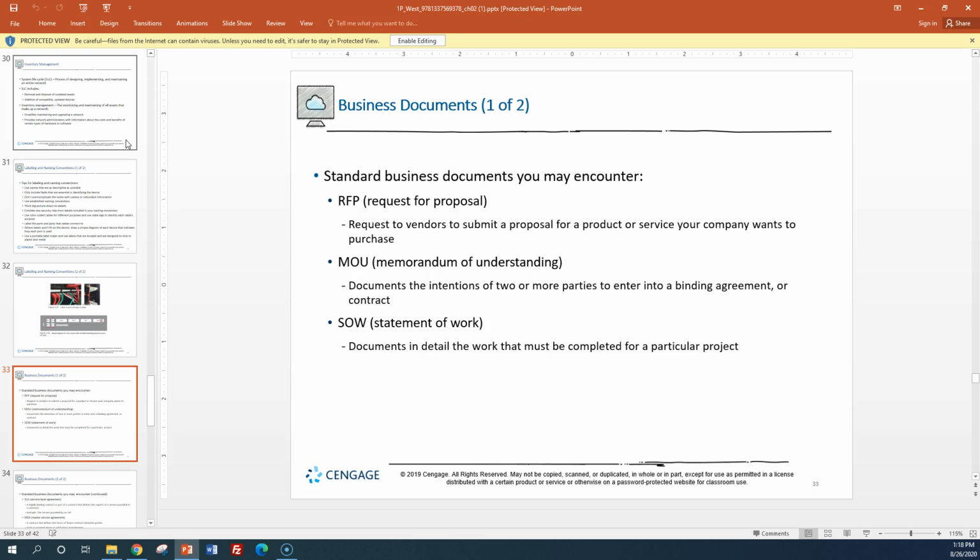Most organizations that are very large require you to do multiple bids. That way you don't have just one vendor. Because if I just have one vendor, can that vendor be buying me breakfast, lunch, and dinner and influence those? Yeah, they certainly can. So we have to be careful. Now, there is a problem with bids. Is the lowest bid always the best bid? No. In fact, a lot of times a super low bid is an indication that they didn't read that RFP, and so you have to make sure that it matches the RFP.